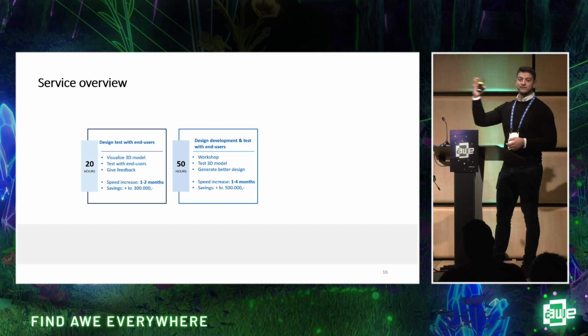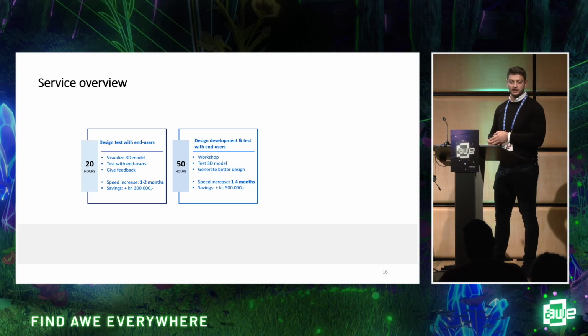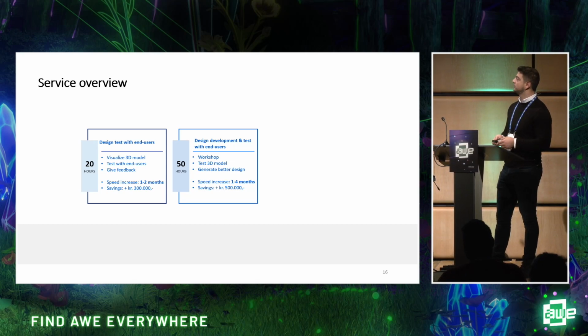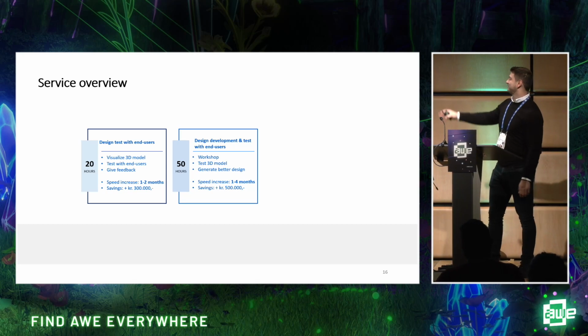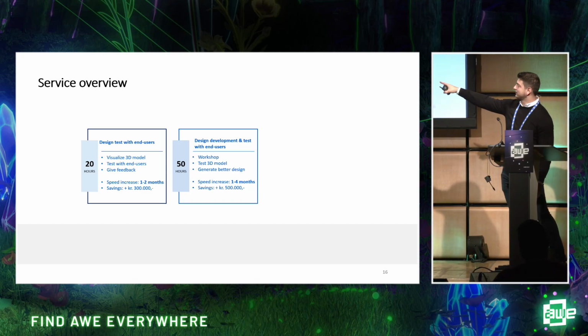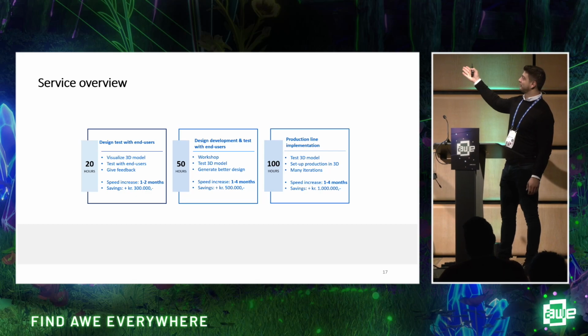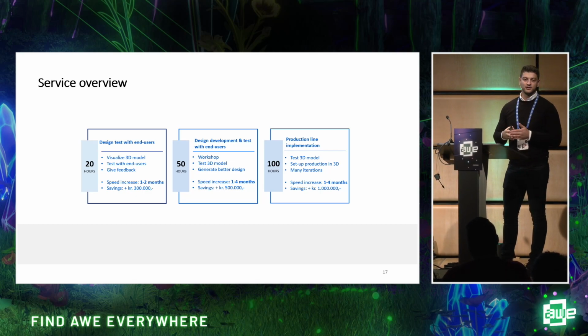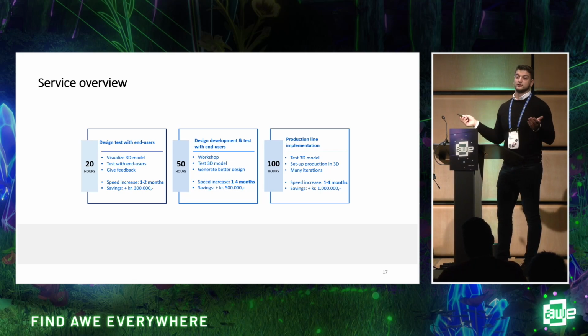If you then do design development, where you get feedback, iterate, and do the design review again, it requires more hours. Oh, this is DKK, sorry. Yeah, this is like 70,000 euro and 50,000 euro, approximately. And if you want to do it on production lines, you're looking at an investment of more than 100 hours for the person doing it. But it's done at the same time while you do the project, so it's quite cheap.